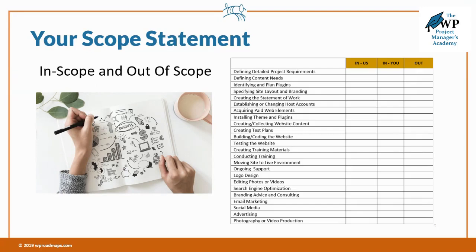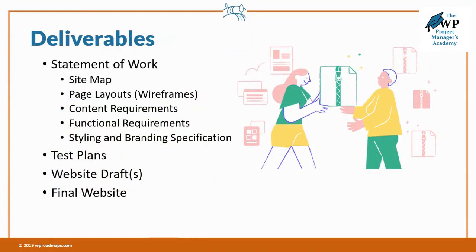So here are all the activities, but where are the deliverables? They should be listed next, along with a brief description of each one. These should be the deliverables that require approval. In our project plan, we have four major deliverables: the statement of work, the test plans, the website draft, and the final website. The statement of work is really the final deliverable after you've gotten approval on all the smaller pieces — a site map, which leads to wireframes, which validates the page layout, then validates content requirements, functional requirements, and styling and branding.